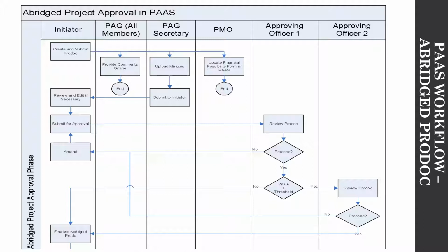He or she would have a space to provide comment before sending off to the program division director, who would then give the approval. And this I'm talking about when the value is over. The same thing with the regional directors, where projects are over 3 million. The approving officer is the program division director. But when the initiator clicks submit for approval, it would first stop in the inbox of the regional director to review before sending off to the director PD.